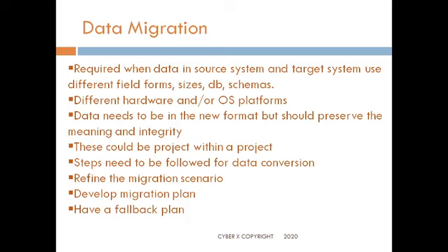We will need to have a proper scope. We need to analyze, okay, these are the modules which will be affected, and these would be the data entities. So that needs to be properly scoped out. We would require a proper migration plan so as to support the migration process and the migration infrastructure. And we'd also require a fallback plan in case things do not work out as desired and we need to fall back on the original from where we started the entire process.